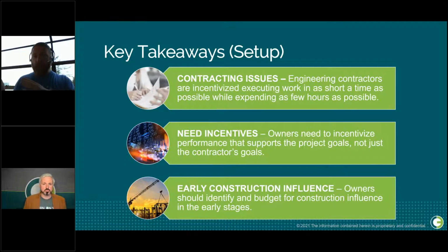The other way you can go is go completely the opposite way and say, we'll pay you your base contract, but we'll incentivize you to the project goals and the delivery of AWP by providing a bonus. We'll give you an extra 5%, whatever it is, of the engineering contract value, scaled to their ability to meet the project goals, deliver the engineering on time, deliver it in sequence, support construction, etc. So as the owner, again, as the primary contract holder, you have ways to influence this with some incentivizing.